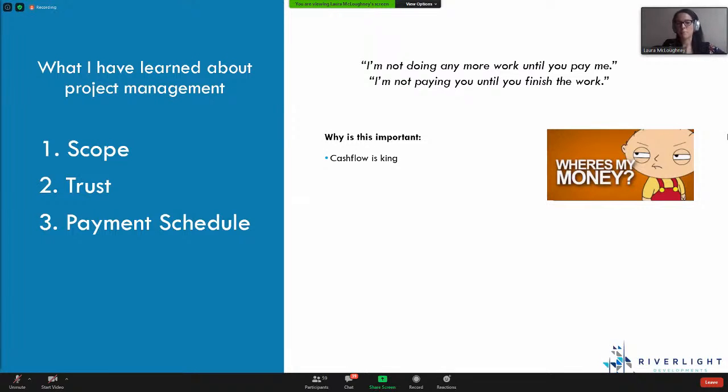Now, if we go back to the scope, the first thing I said about scope, now I can't even remember my own presentation, guys. This is great. The first thing I said about scope was understanding what your payment schedule is when you quote. Because if that contractor, builder, professional says to you, well, actually, no, we work on 7-day payment schedules. You'll pay us every 7 days for this project. You've already begun to go work and they've invoiced you, and you're going, no, my lender's not going to give me money for a while. We're not going to get the first drawdown for another 5 days. You're already on your first week and you are now having a beef with your team. That's the worst case situation to be in.